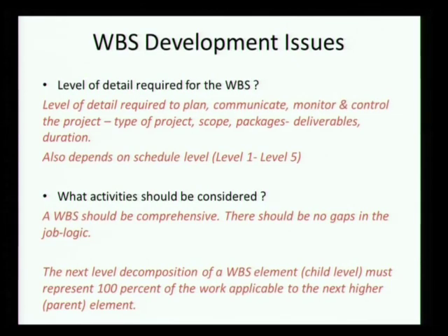Okay, so here we raise this question. It's a common question: what is the level of detail required? We would say the level of detail required is basically what is needed to plan, communicate, monitor and control the project, given the type of project, scope, package, deliverables and duration. Another very important factor in the level of detail is duration.